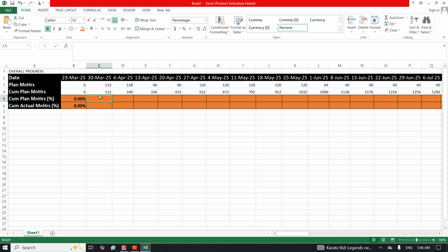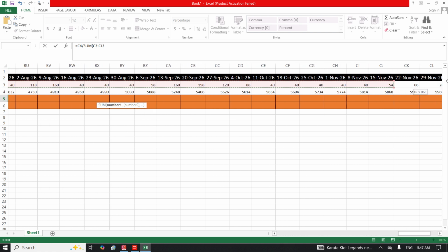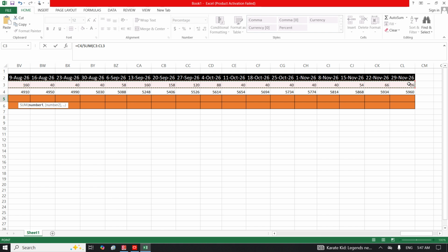And what are we doing? First of all, we do equals to, we divide the cumulative by the sum of the plan man hour. We divide the cumulative by the sum of the plan man hour. Before I press enter, I need to make sure that this is actually frozen.